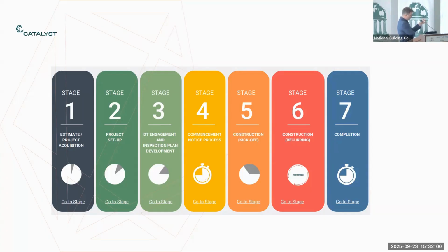If it's a 7-day notice, the project details as well in that form, the wording of that has to align exactly with the 7-day notice, or again, you could be looking at revised information or invalidation. So the project description has to align exactly with the 7-day notice. So there's a bit of coordination there to do with the fire consultant.